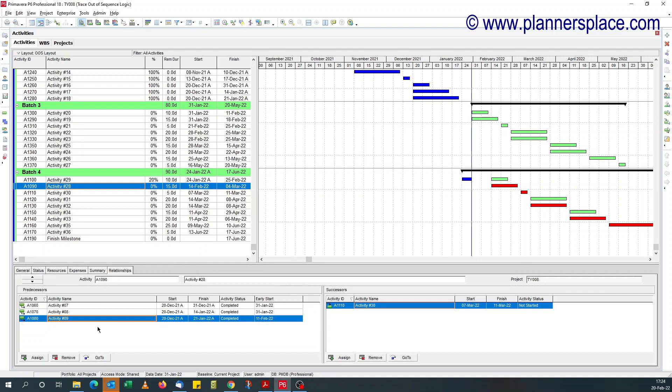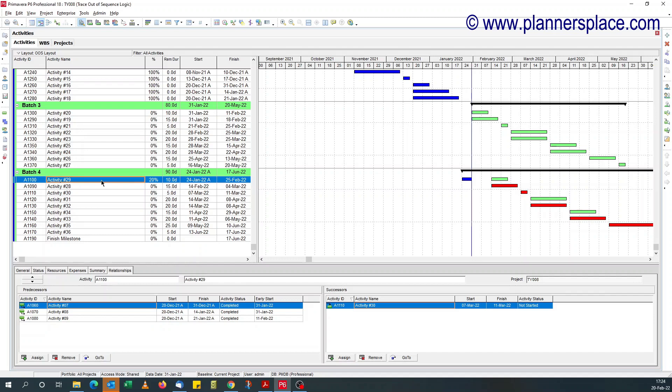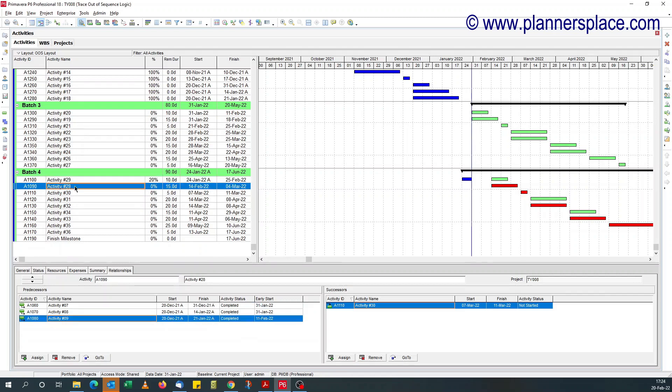So just by adding the early start date, I know the activity causing the out of sequence, this delay here, this gap here is linked to activity number nine. And also for this, you can see it's the same thing, activity number nine. So let's trace it.